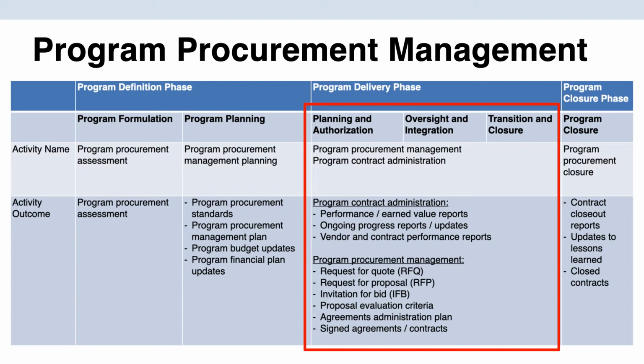And then we actually go out and do the procurement here. So we are formulating our request for proposal. We're inviting the vendors to bid for our project. We are evaluating them and signing the final contract. Also, we are monitoring their performance and giving them feedback.